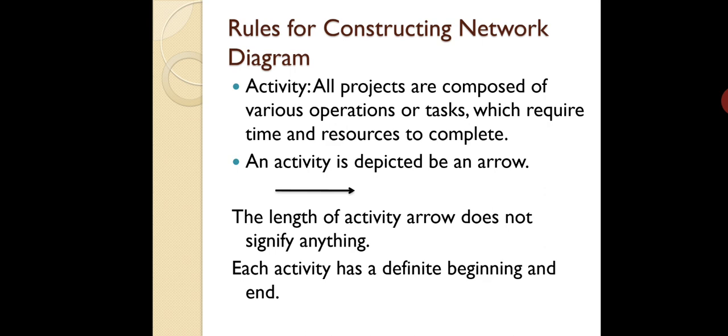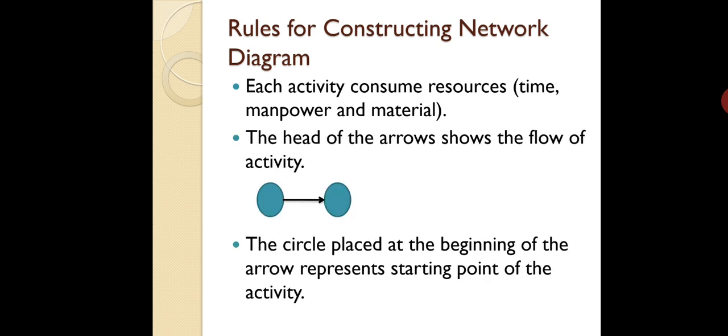Alright. The length of the arrow does not signify anything, so you can make it small, you can make it big. If the length of the arrow of an activity is big, it doesn't mean that this activity is going to take more time. The length does not have any meaning, but each activity has a definite beginning and end. Each activity consumes resources, time, manpower and material.